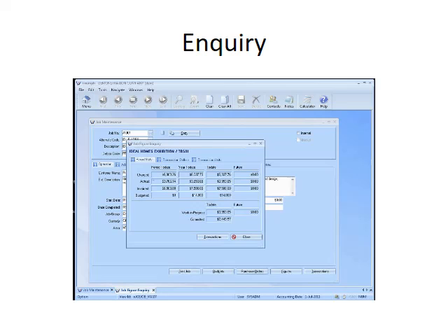So it will give you a few numbers here. The key one, charge, is based on the markups that you've calculated. It gives you the theoretical chargeable figure. So how much you should have charged out, not what you've invoiced, but what you're proposing to charge out based on your nominated markups. Because we can all do a job and say we're going to charge it out at rate, but if it doesn't actually work properly and you've got to do extra costs, then you don't actually always get your chargeable.